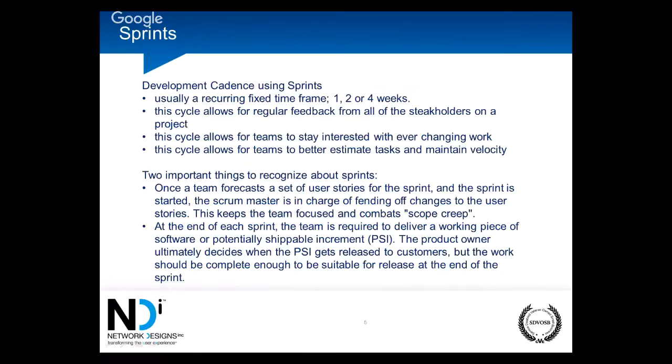You take that velocity for one person and multiply it by the number of people on the team, or you have everyone turn in their own velocity. So let's say our velocity for the team for a 2-week sprint is 400 hours. You create this sprint, and you collect the issues that are breakouts of each user story into a group, not exceeding your team's velocity. So if I'm the only one on the team and my velocity is 35 hours in 2 weeks, then I can only collect enough tickets to equal 35 hours over my 2-week sprint. I hope that's clear to everybody. Nobody's giving me any questions, so I'm going to run with it here. So basically, you gather your team velocity and you build your sprint around that team velocity.